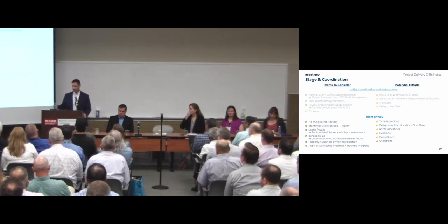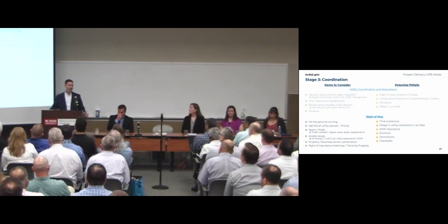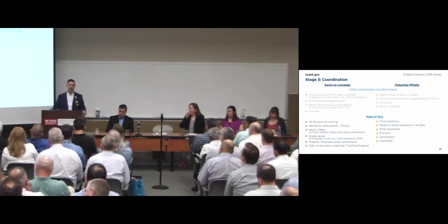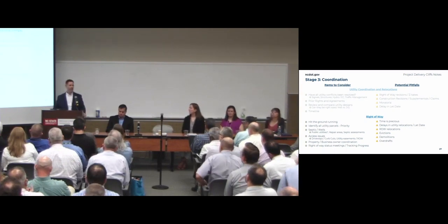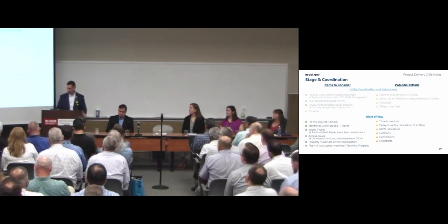And through all this, whether it be utilities or right-of-way, we're going to be monitoring overdrafts with the new financial guidance. If you get into overdrafts, you're going to delay payments to property owners. They may get frustrated, pull out of an agreement. We can't pay our consultant partners. So, as DOT, we've got to monitor those overdrafts and make sure we're looking at the overall budget.